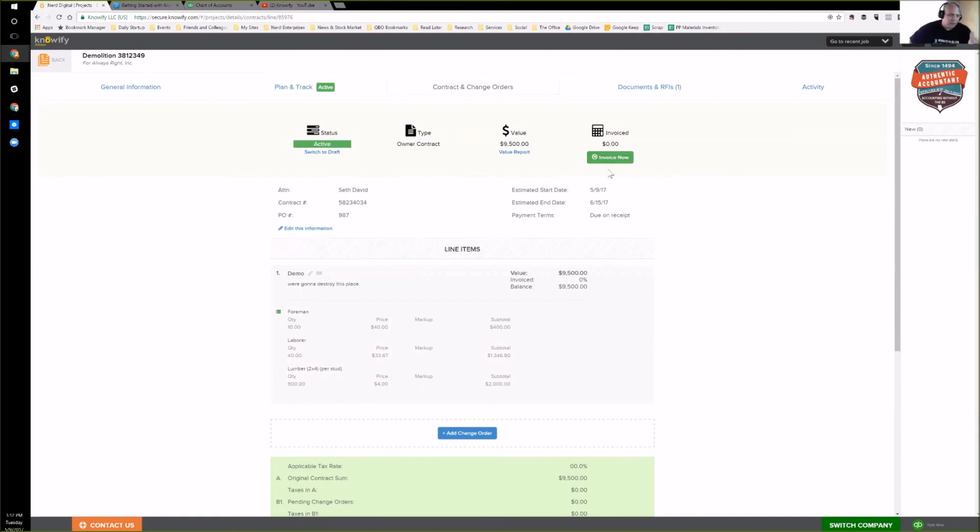So I believe for California, I could be entirely wrong, but it probably is a California thing because we're a little crazy like that. I think it's up to a $1,000 deposit or 10% of the contract, whichever one is greater. Less. Okay. Greater probably makes a lot more sense, but I think that's how the invoicing rule works as far as California goes. Gotcha. So anyway, there's a feature in the account that'll automatically generate a deposit invoice for you.